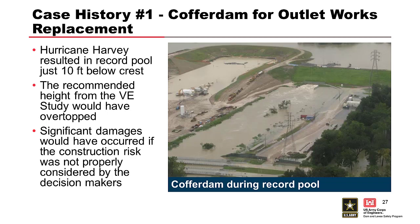As it turns out, Hurricane Harvey occurred during construction, resulting in the largest flood in the project's history with between 35 and 40 inches of rain measured in the project area. A new record pool was reached that was just 10 feet below the cofferdam crest. The proposed VE study cofferdam crest would have been below the new record pool — if the cofferdam had been constructed at that lower crest elevation, significant downstream damages would have occurred along with potential for loss of life.